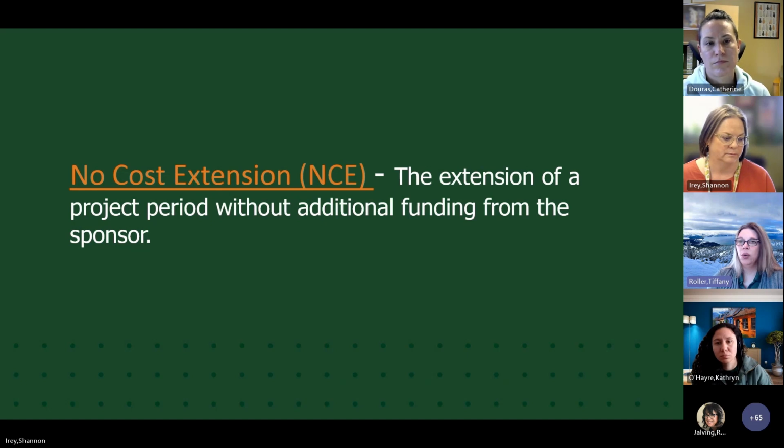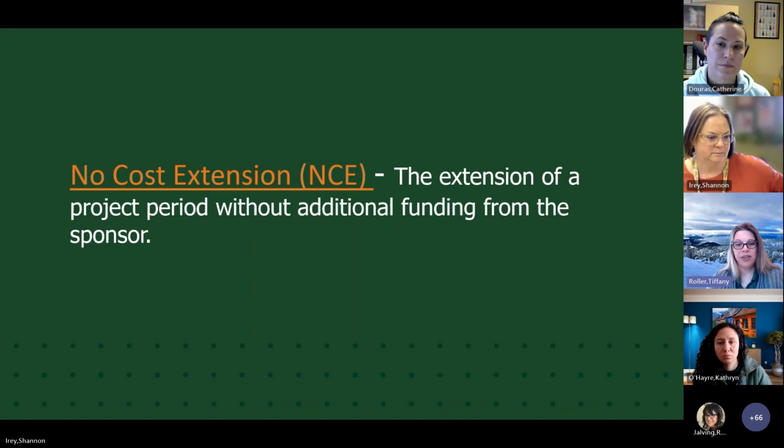I have occasionally gotten questions in the past, or I've seen a PI ask for maybe only 3 months. And one of the questions that I'll have back to them will say, are you sure? Because if you need more time after that, that moves into a second NCE, which can sometimes be more complicated. So, you know, they will typically allow up to 12 months on that first NCE. And so unless there's a really good reason to super limit it down to only a couple of months, I usually am going to ask why we're not taking the longer period.